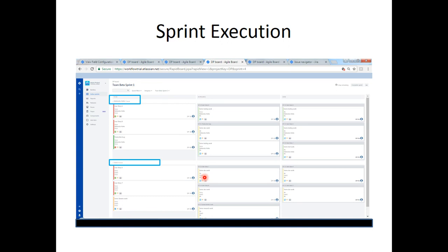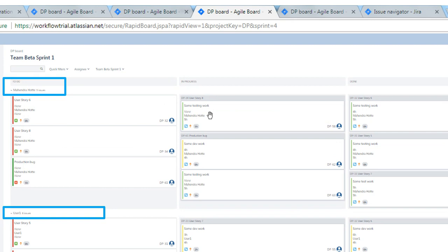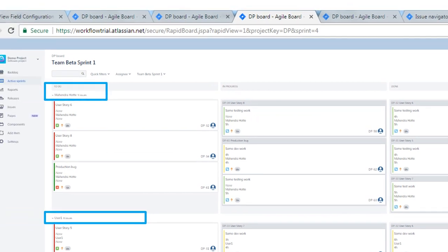This will arrange the stories or the work based on an assignee. This is how the board will look if you use assignee-wise. Let me zoom a bit. This is how the board will transform if you choose assignee-wise. In this type of layout, all the standard issue types and the subtask issue types assigned to a particular user are grouped. So based on the user, everything is lined up in the respective columns.